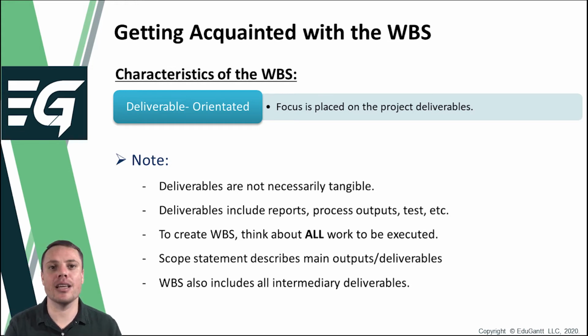There are, however, some project managers and project organizations that still prefer to break the deliverables down into work to be performed and to include all this detail in the work breakdown structure. We personally prefer the method suggested by the PMBOK Guide 6th edition because there is some merit in keeping the work breakdown structure as simple as possible, and showing decomposed information up to the work to be executed level adds an immense amount of detail to the WBS. But we will talk more about the merit of simplicity later on. Regardless of which approach is followed, the WBS remains a very important project management tool.